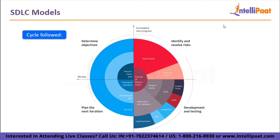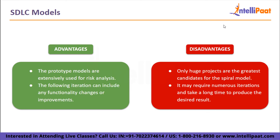For advantages, prototype models are extensively used for risk analysis, and any functionality changes or improvements can be included in the following iteration. For disadvantages, only huge projects are the greatest candidates for the spiral model, and as it may require numerous iterations and take a long time, the cost may be substantial.